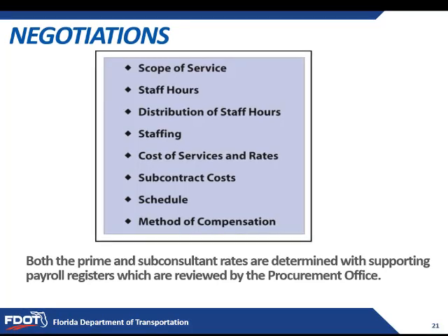Schedule. The schedule will have a direct impact on the project cost. Both project managers should review the schedule carefully to understand the project milestones and delivery dates. If adjustments can be made to the schedule, this is also negotiable.